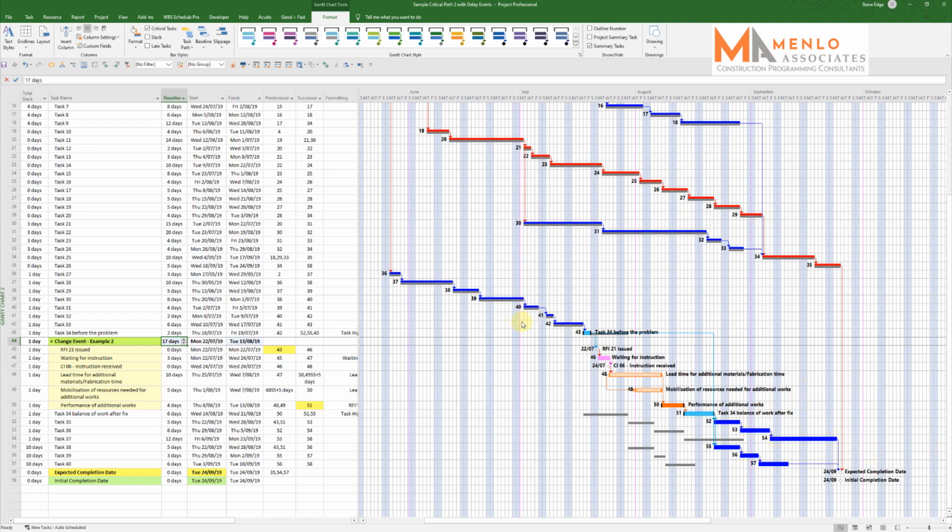So whereas this previously had very little impact on critical path, what this variation has actually done is bring it much closer to critical, and therefore much harder, ingrained in the risk of the job. This chain becomes much more risky because any delay suffered now by the contractor will push out, and if it's delay caused by the contractor, it won't be claimable as an extension. It will be impact or delay caused by the contractor, which is not claimable.